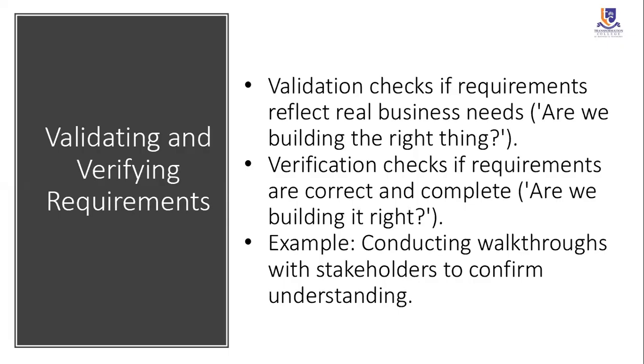to get a confirmation that the requirement they gave to you, and how you analyzed it as a BA, meets the goal of the business, or the need of the business, or addresses the solution of that business. So you need to conduct a walkthrough session for verification and also validation of the requirement. Are we good? I don't know if there's any question before I go further. Do we have any question or are we good to go? I'll need reactions, please.